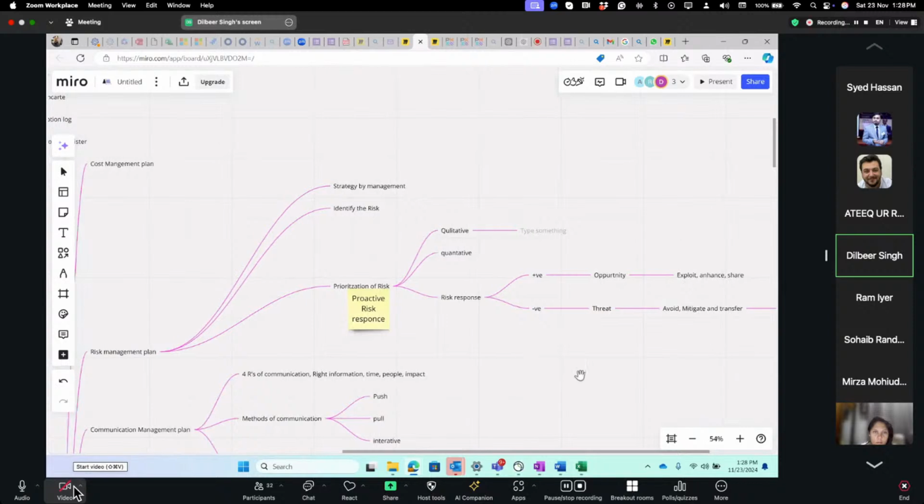Next, we may go to risk. So what is risk? You can say probability multiplied by impact is known as risk. First we have to identify the risk, and for identification of risk we have these techniques. First we go to the sponsor or subject matter specialist, then the focus group, then facilitated workshop. We have documents and plans, OPA, EEF. In it we identify the risk.